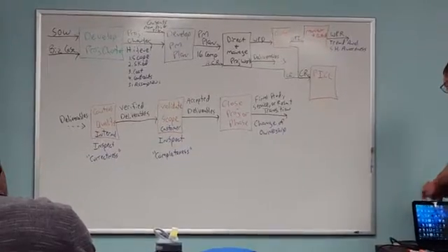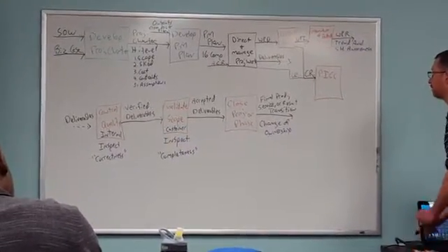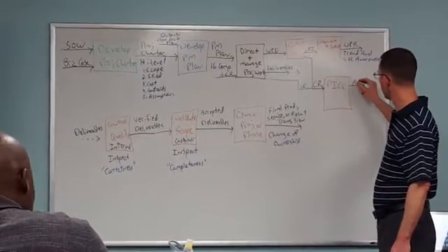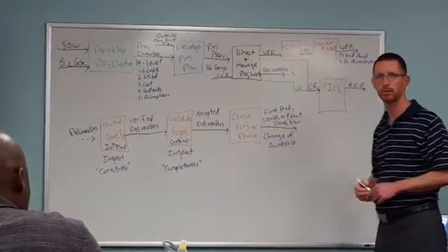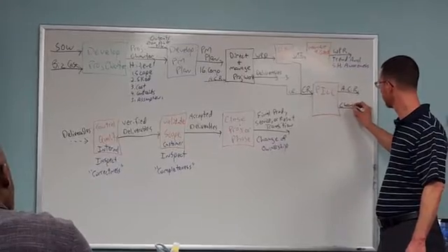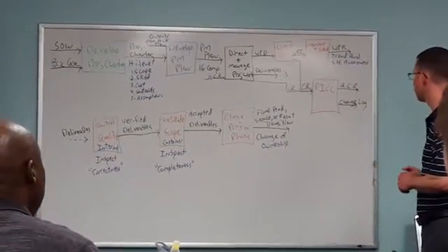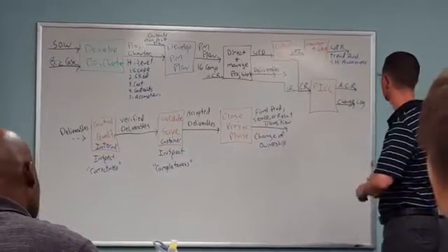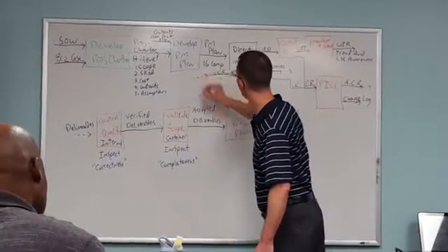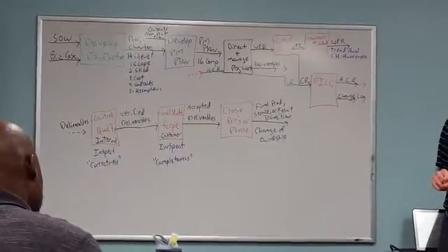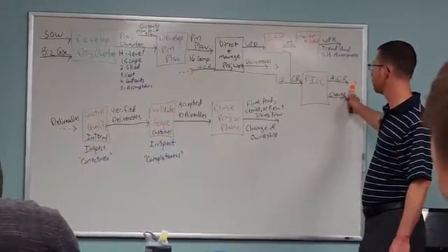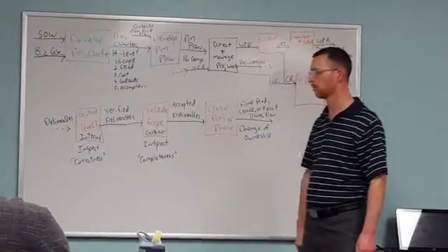All right, so what do I do when I'm considering change requests? Well, I decide whether I'm going to approve them or not. So the outputs of perform integrated change control would be, right, ACR, approved change request. And what else? The change log, that's right. So those are two things we're going to create there. And notice that approved change request right here, I'm doing a color here so that you can see it. Approved change requests are implemented during direct and manage project work. So there's a connection of the dots between perform integrated change control. Every change request that gets approved is then implemented through direct and manage project work.